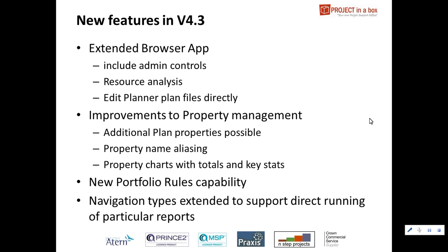So what we've now done is to build that into the browser app so that you can check out a plan effectively to the server. You can update the content of that, and in fact that's pretty much a full plan edit and creation capability. So you can add new tasks to it, you can add summary groups, you can update percentage completes and add resources, etc. You can create new tasks, manage them, delete them, or just simply update them.